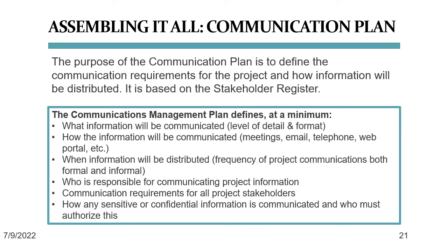It defines who is responsible for communicating project information and the communication requirements for all project stakeholders. Lastly, the management plan defines how any sensitive or confidential information is communicated and who must authorize this.